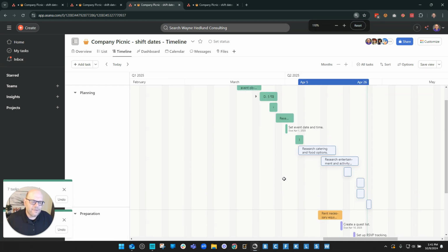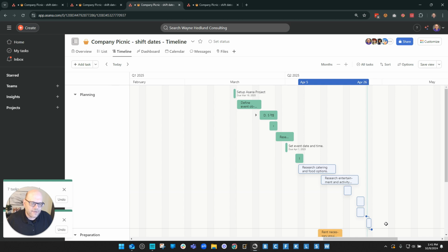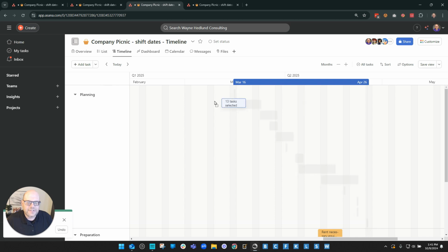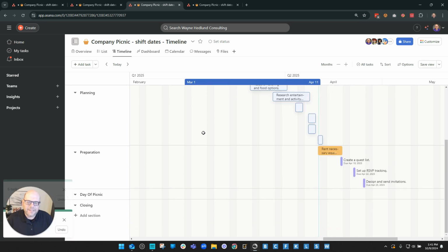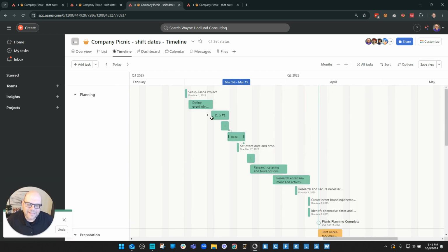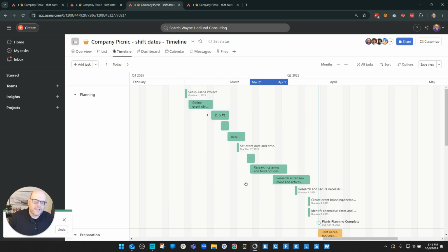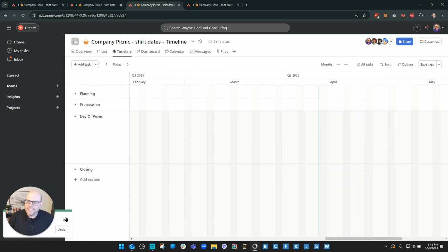I'm going to zoom out a little bit, because if you zoom out on your browser, you also can highlight more tasks. Most of you probably have realized too that I'm still messing up, because you remember I'm not selecting those subtasks. So those tasks are not moving as I move everything else. That's one of the downsides if you use a lot of subtasks. So the other approach, if you're going to use this method, is actually to start at the bottom.